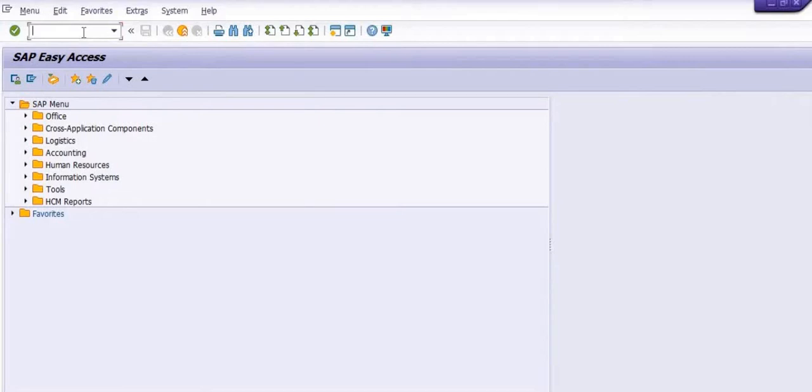Okay. So you need to understand the concept behind the work breakdown structure, because we are going to create first the project, then we divide the project into several WBS. In each WBS we will create network elements, and in each network we will assign activities like services, overhead, survey cost, material cost, labor cost. We will assign different network activities in the network element. Okay, so this is the main objective of the creation of the WBS.